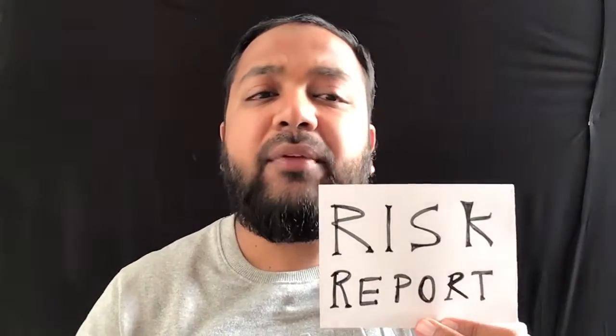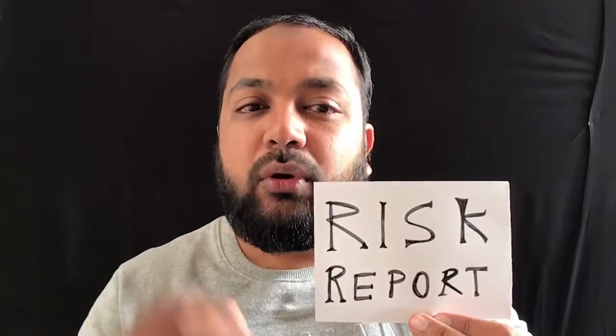After that, let me come to the sources of risk. Initially you will update them in the risk report. So we'll update the sources of risk in the beginning of the project, and then we'll also figure out what are the different sources of risk that come up throughout the project. We'll go and look into these different sources, right? You might have missed some of these sources, so go and update the sources also in the risk report. You could do this at any point of time in the project.